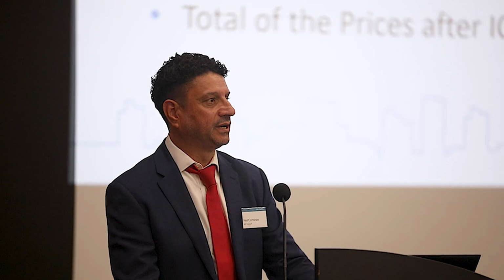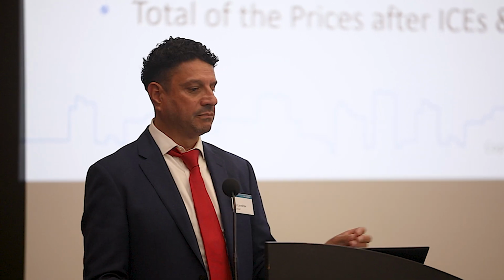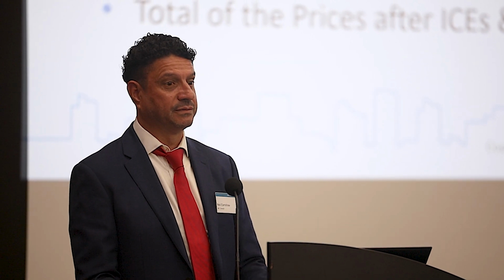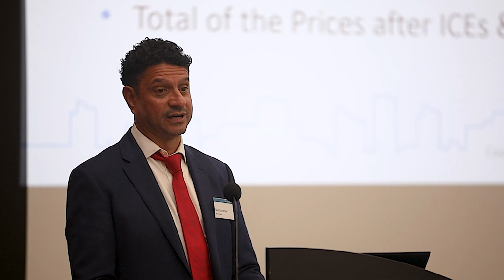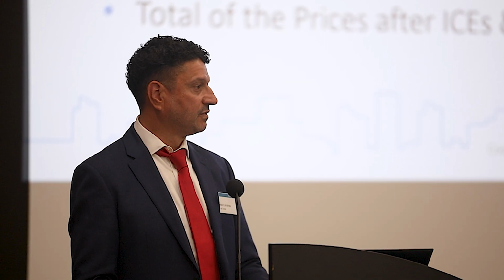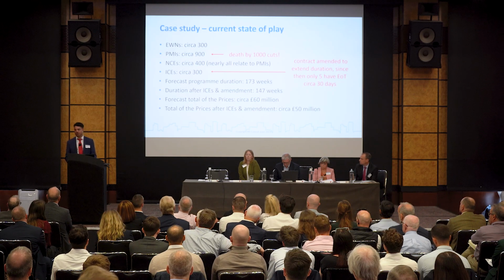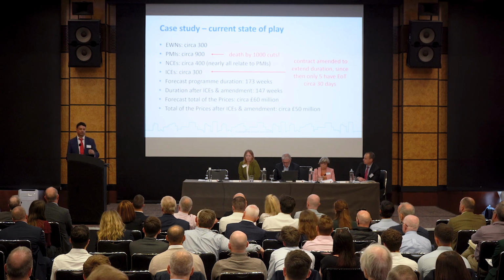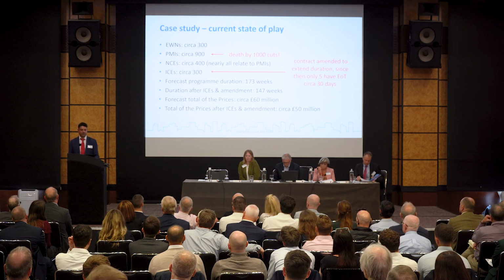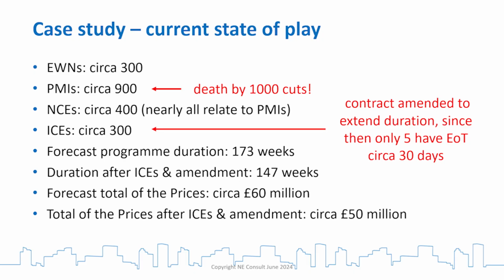Now, if this contract was being administered correctly, as in accordance with the contract, there's £10 million there because it's option A that hasn't been paid. Now, I think it's a good thing that the project manager has chosen not to do that and to pay on account for the things they know. The things they know will have an impact, that they've made an assessment already that we know there's some money there. So I'll give you some money on account. Not in accordance with the contract. 10 million quid difference, though, could send a contractor bust. Back to Yusuf's point. Yeah?